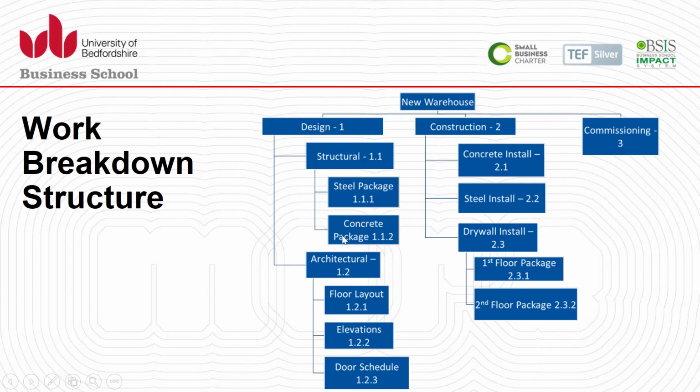We do this to complete all work packages, and then we calculate from the bottom up how much time and cost needs to be allocated to each activity. I hope this makes sense to you, but we're going to have a discussion in our workshop to further elaborate if you need a clearer understanding of the work breakdown structure for project scope management.